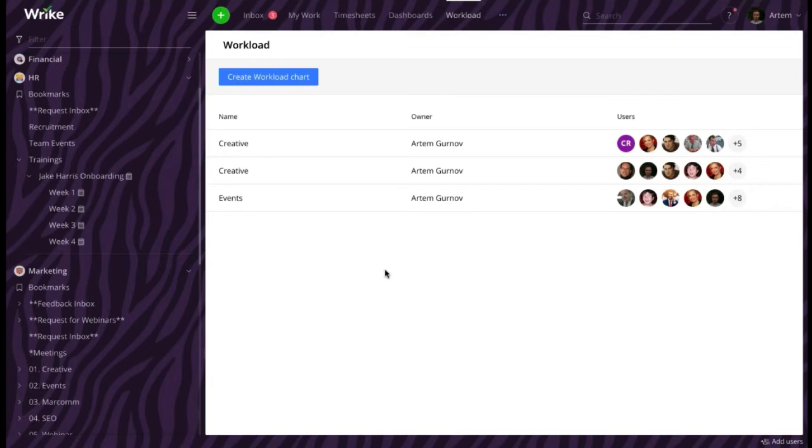You will be able to do that only if you create a custom field and add the information when you change the status of the task. So basically, if your tasks go through, let's say, 3 phases, you can add custom fields and manually add the date of the day when you make that status change. Also, this feature is going to be available in our another add-on called Wrike Analyze.